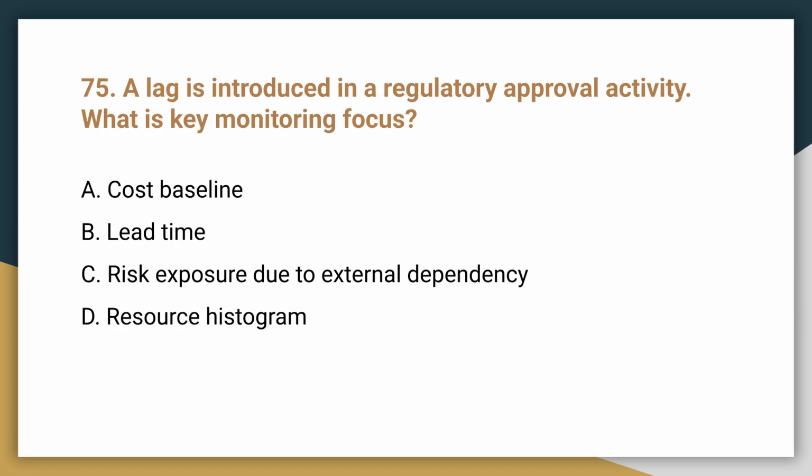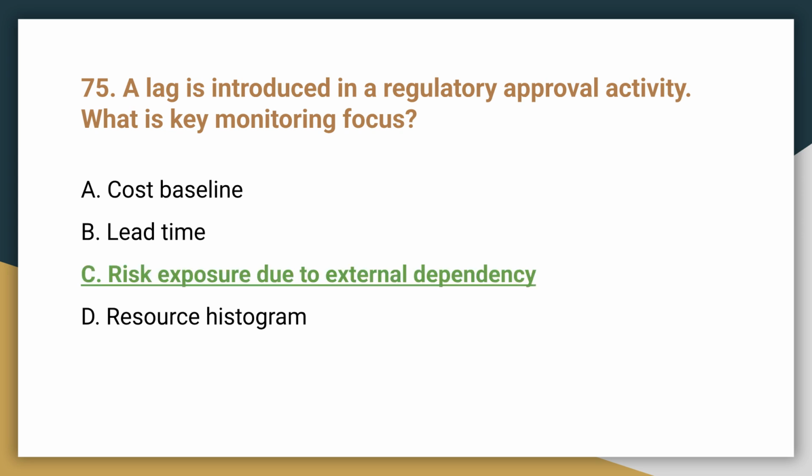Question 75. A lag is introduced in a regulatory approval activity. What is the key monitoring focus? The key monitoring focus is C. Risk exposure due to external dependency. External lag significantly increases schedule risk exposure.